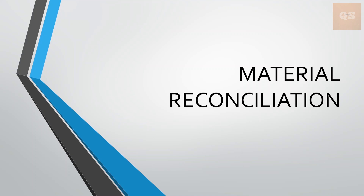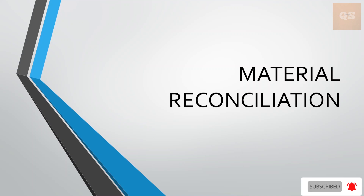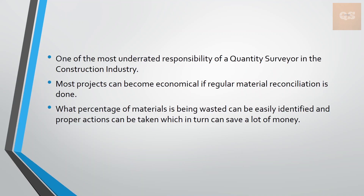Most construction projects are going into loss and there are different reasons for that. One major reason is not having proper monitoring of the materials being delivered to site. This is one of the most underrated responsibilities of a quantity surveyor. If a regular material reconciliation is done in any project, then definitely these projects can become more economical, and the percentage of materials being wasted can be easily identified so proper actions can be taken.